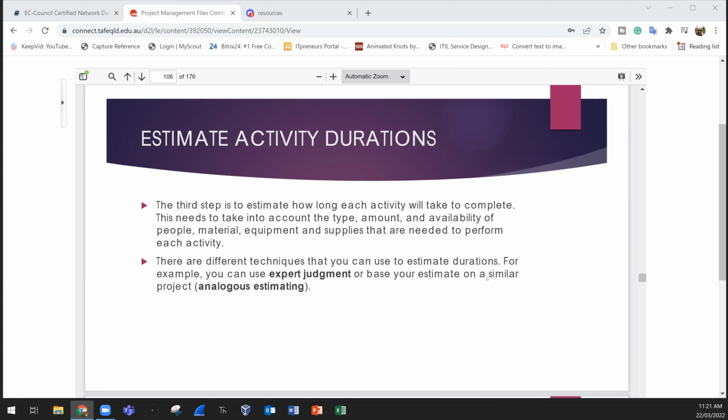In reality, we are paying for 10 working days. But on the plan for the project schedule, we are calculating these 2 days in between. We are calculating that as time, not as money. Why? Because I need to determine the delivery date, the final date for any delivery. That makes sense?